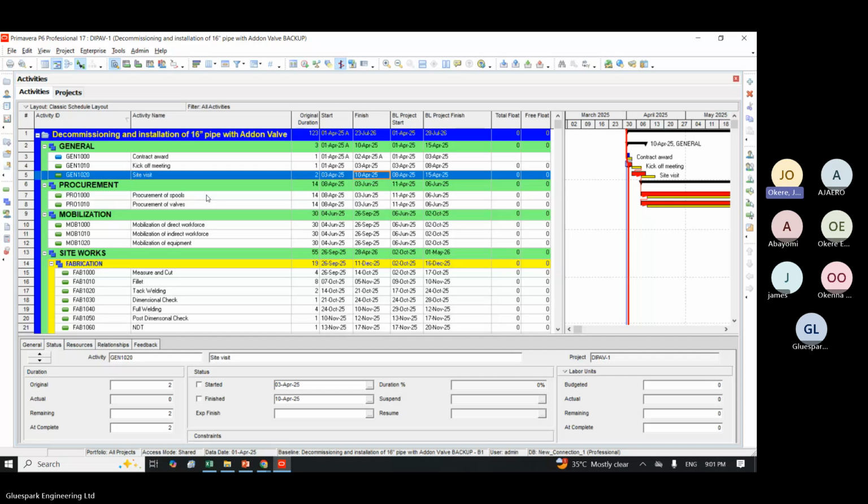Out of these 3 contractors, one of their planners will become the integrated planner. What he will do is collect the scope and the schedule from each of these contractors and integrate them into one schedule. And we call it an integrated schedule. So for ease of executing this integrated schedule, you need an activity code.